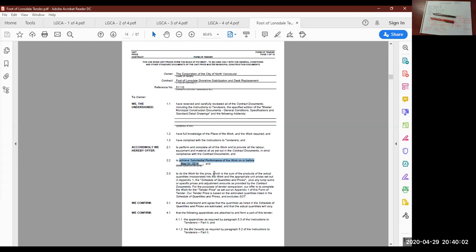If you think it's going to take 6 months to build the project, but the completion date is only 4 months, then there's an issue. That sort of information you should tell your manager, or whoever you answer to as a junior estimator. There are different things you should do if you run into that problem. I won't go into them now. If you're curious, you can send me an email and I'll tell you, but we'll run out of time today if I get into that.